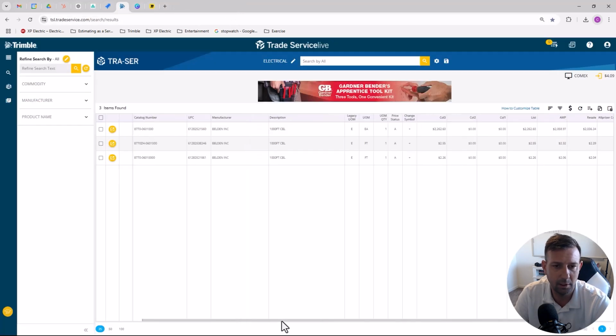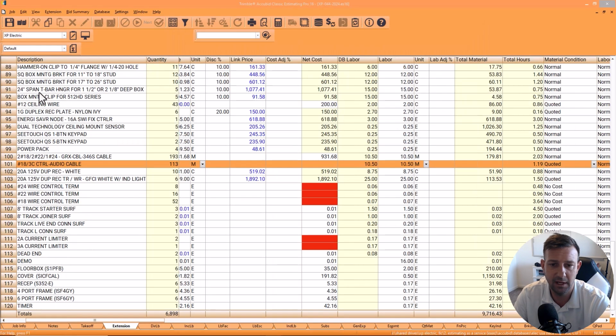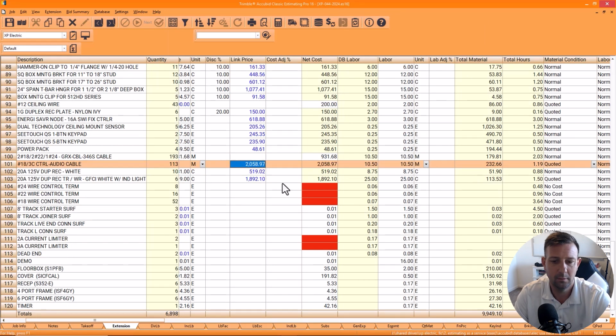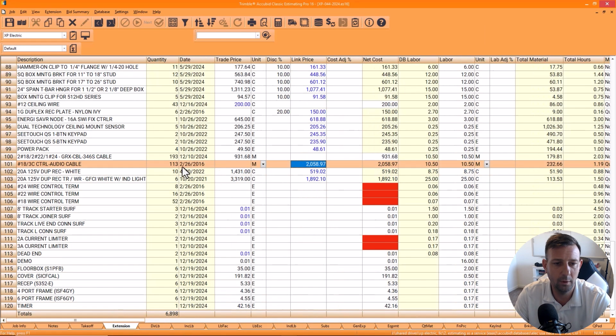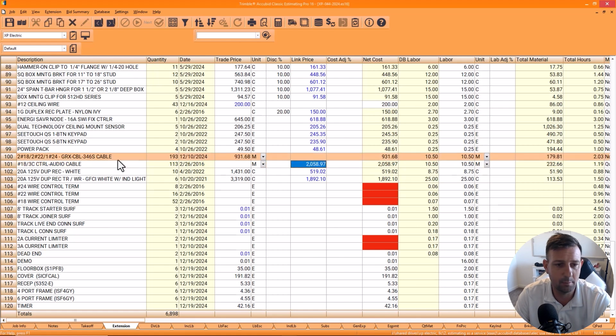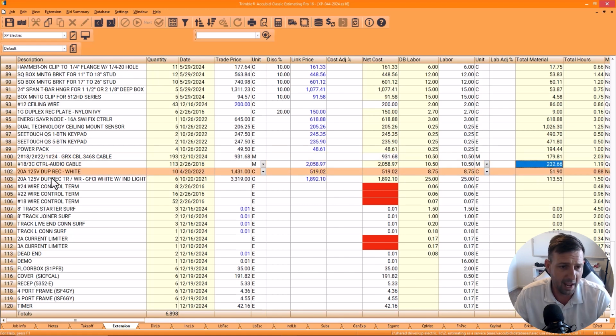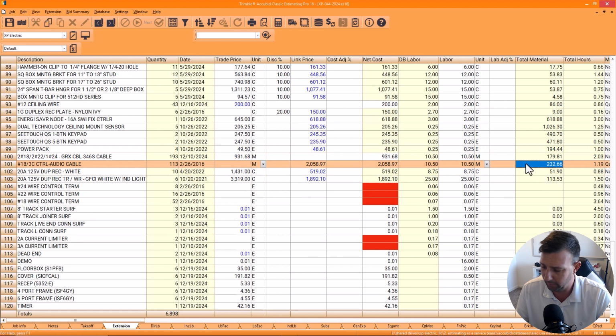So it says that the Belden cable is list price, average market price, $2,058.97. But here's the interesting thing though. We've only got 113 feet, right? And if they only sell it in 1,000-foot rolls, then that means you're going to have to buy a whole 1,000 feet just for 113 feet. So if we only left $232 in there we would have to end up eating some of that cost. So we need to make sure we have costs for a whole 1,000-foot roll.